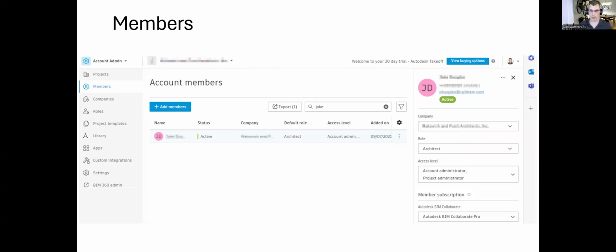and it works for me, and it's worked for me for the better part of the last decade. I approach the Autodesk Construction Cloud like this: you want the data in it to be as clean as your ERP. You really want the companies to be clean and tight, and the roles to be clean and tight. With all of our processes, it's basically internal versus external. If it is a CPL employee joining the firm, I go into the back end and program their default role and company so that every project they ever get added to going forward, they automatically get the correct permissions and company. So the project managers just invite Johnny, the intern, and it works, right?